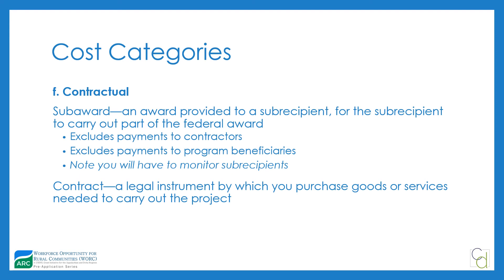Subrecipients typically have programmatic decision-making responsibilities and are using funds to carry out the program for public purposes specific to the award. The key difference comes in implementation — your responsibility for procurement with contractors versus sub recipient monitoring for sub awards. As a pass-through entity with sub awards, you are responsible for your subrecipients: you'll conduct risk assessments, monitor their performance regularly and through formal monitoring, and handle their funds. Their performance is your performance, so choose your sub recipients wisely.